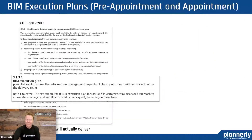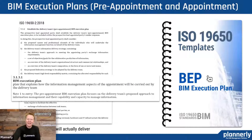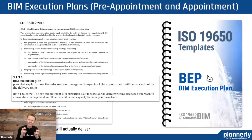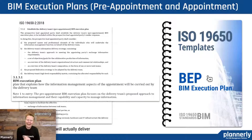When we talk about BIM execution plans, this is one of the most talked-about documents. We do have a template for that. The principle is that it's broken into two parts: one is an answer to the appointing party's requirements, and then as you start to work on the project, you build and continually improve it. This is really how the project team will be delivering — what are the processes and the steps that teams are going to go through. This is where rubber meets the road.